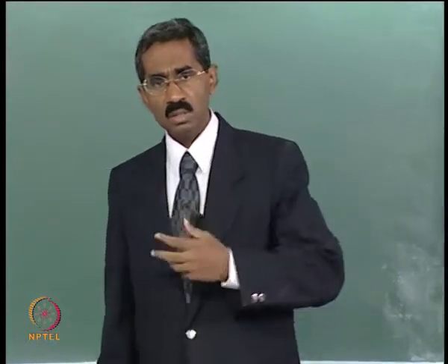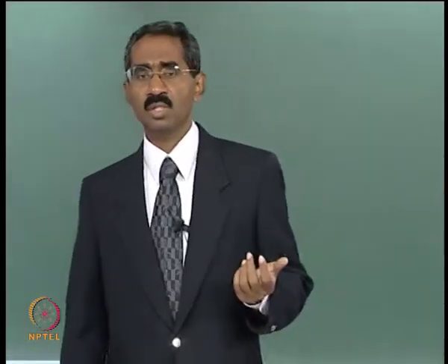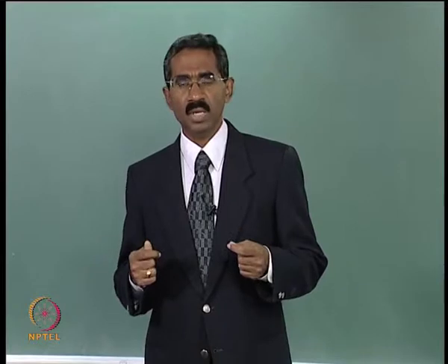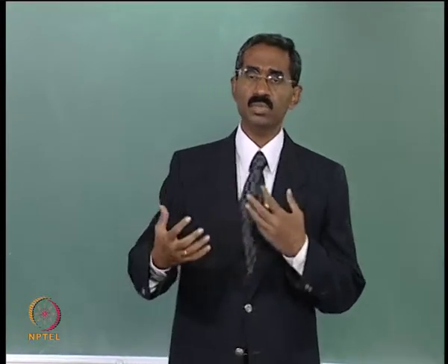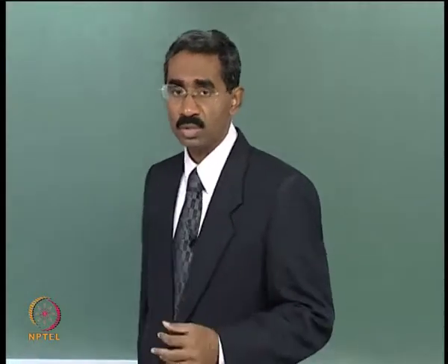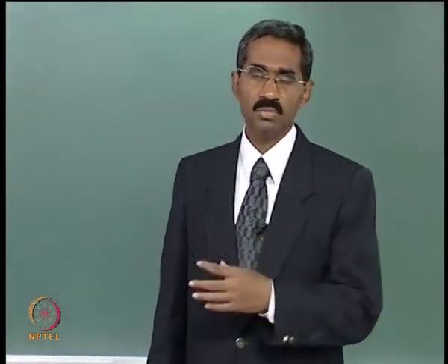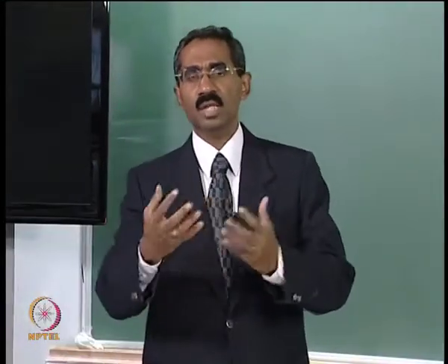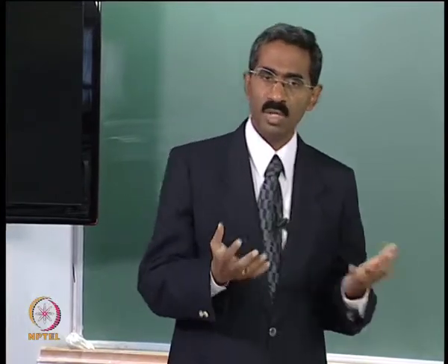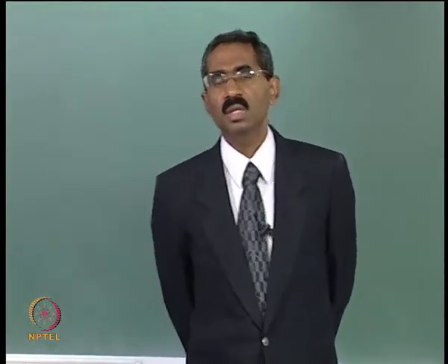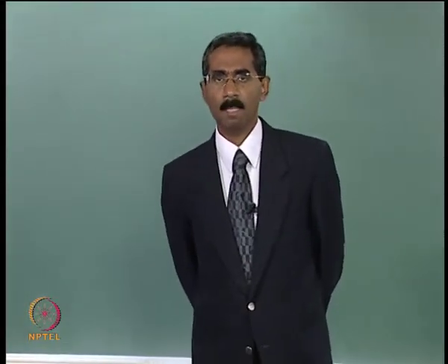Why is a contractor not compensated for the additional costs? Because the contractor, as a part of his risk management process, should have insured for some of these force majeure risks. So for example, the contractor should have insured for the occurrence of an earthquake, for fire, and for floods, and so on and so forth. So whenever these kinds of events occur, the damages are going to be compensated by the insurance firm, and therefore the project company need not compensate the EPC contractor.